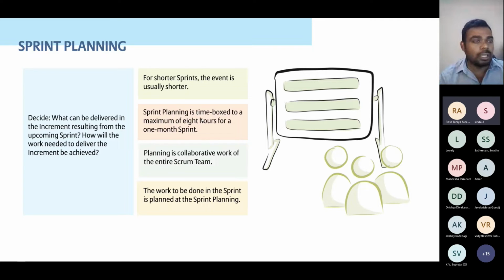All we need to do is task it out and check the dependencies, check how it can be implemented, and whether the architecture is fine or not. From a testing point of view, can I test it? Can I have all the scenarios in place before I test? Is that clear for you guys? Those are things that we have already defined. So the planning is mainly about creating tasks and estimating them. That's how the planning goes.